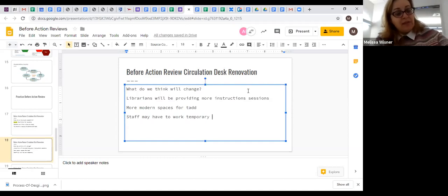And so a lot of the spotlight and attention and conversation is naturally put on, hey, we're going to have new space. But the reality is, in order to get to that new space, the outcome, we're going to need swing space. And let's spend a little bit of time thinking about the quality of work life for the length of time that we anticipate needing that swing space.